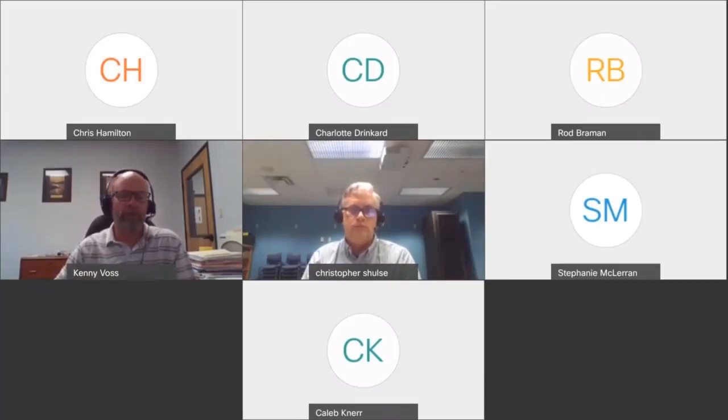And the reason why they have to call or contact you is because the RES form is really based on what's in the STIP, right? Exactly. Yes. And our specialists look at those RESs. They're keying in on A dates, PS&E, letting, those types of things in order to prioritize their work.